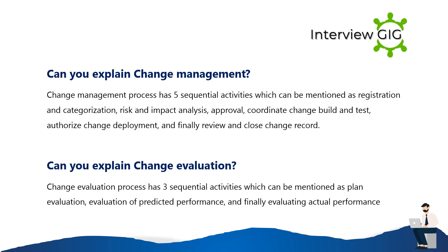Can you explain change management? The change management process has five sequential activities: registration and categorization, risk and impact analysis, approval, coordinate change build and test, authorize change deployment, and finally review and close the change record.